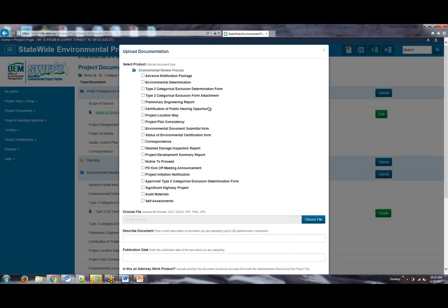If you're doing a reevaluation, you pull together the approved previous document and the supporting materials at the time that you're looking to get the reevaluation approved through the system. If you're working on a new environmental document, a type 1, a type 2, an EA, an EIS, this is the filing system where you need to make sure all that supplemental information is carried into the file.